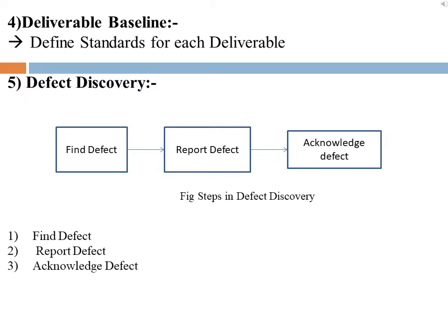And the next is to define the standard for each deliverable. Set the requirements for each deliverable and the criteria that must be met before the deliverable can be baselined.